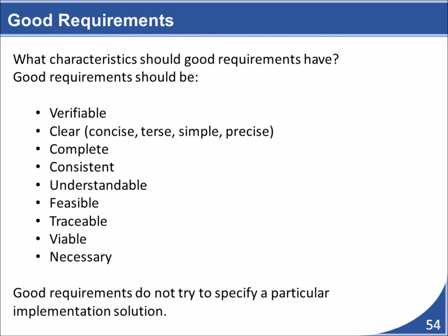With experience, you will come to recognize good and bad requirements. But a good starting point is, if you don't know how you're going to test a particular requirement, or if the requirement simply cannot be tested, then it's not a good requirement. Don't accept it. Always spend the time to clarify the requirements before proceeding with the project. You will be thankful that you did when it comes time to do quality control for the project.